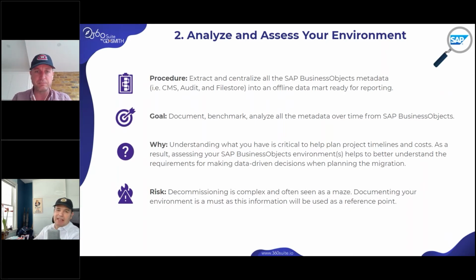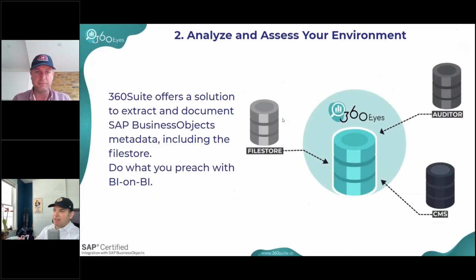Bruno? And Patrick, in fact, in terms of assessment, today, if you want to do any type of migration project, whether it's decommissioning or not, you need to have a solid assessment. There is no way that you can actually quantify a project without doing a true assessment. I mean, there are so many customers when we talk today where without 360, they have no understanding, they have no idea of how many users are really using, not using, who are the power users. And yeah, we have another slide on this.